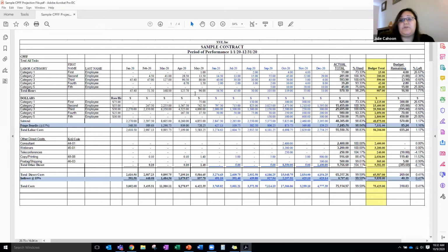In this particular tool, you'll notice that in May 2020 the text is black, and then in June the text is blue. What this is showing you is that all of the text in black is actual. That is what your project actually spent to perform the work for the deliverables and tasks. The blue indicates a projection. So this is your estimate of how much work is going to get completed on the work that's remaining for the remainder of the project period.